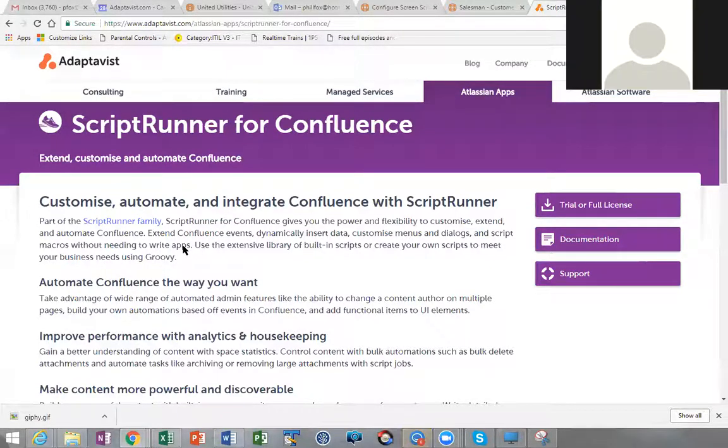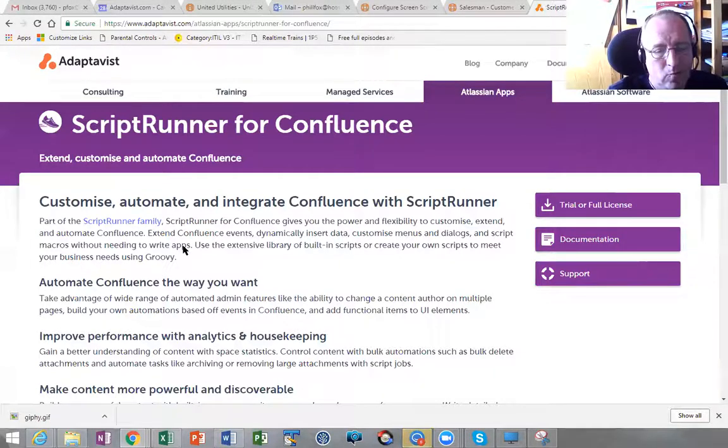Is this the first time you've done this? Not directly. Get your big picture, break it down into tasks, take one of those tasks, break it down and break it down and break it down until you've got a simple achievable bit. So to begin with, your minimum viable product is really so simple, it's ridiculous.